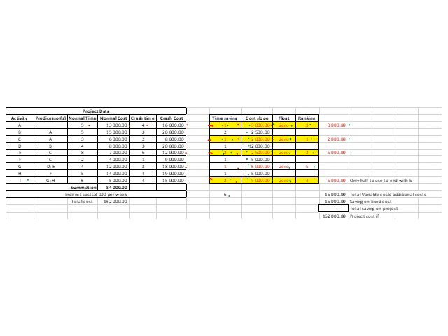Our next ranked item is item I, and we only have to save 1 week here. Thus, we don't multiply it by 2, we only multiply it by 1, so we have an additional cost of 15,000 rand if we add all of these together. So we've got our additional variable costs that we calculated.